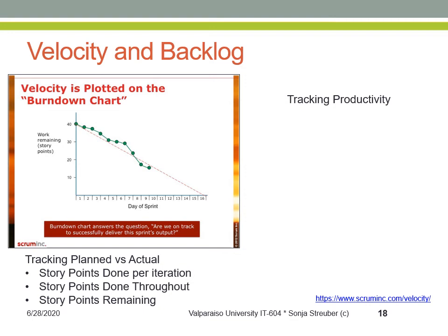How many story points were done cumulatively in all iterations since the start of the project? And how many story points are still remaining, either in the sprint backlog or in the overall product backlog? This tracking happens with the help of two main charts. The first one is called the burndown chart. In the burndown chart for a sprint, we plot the assigned story points for the sprint in a linear fashion. That is the red broken line here. And each day, we plot the remaining story points against that line.